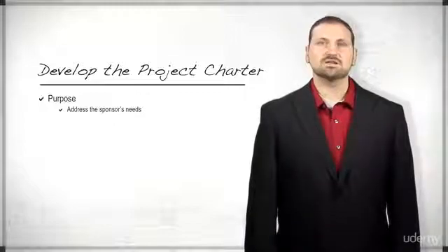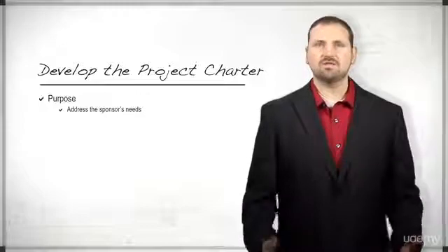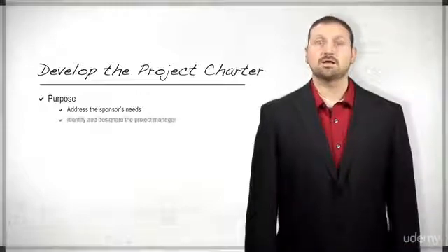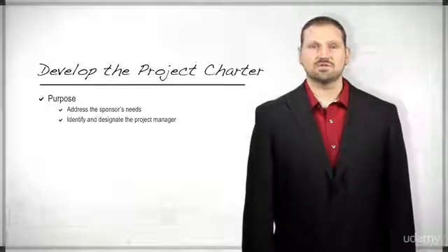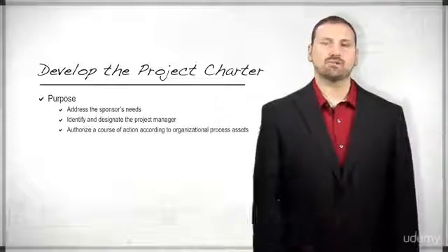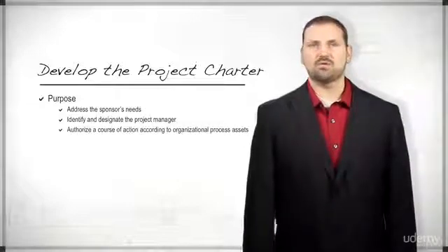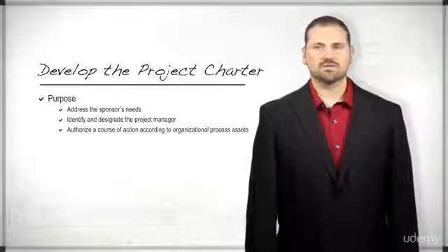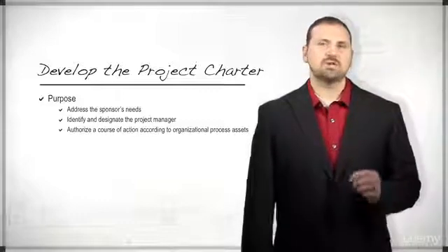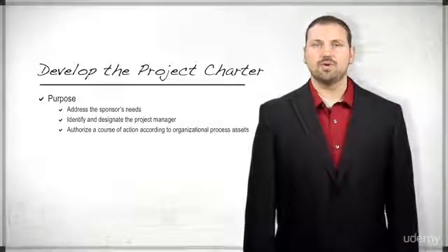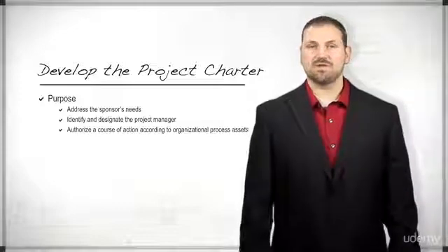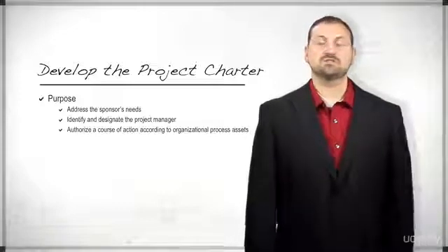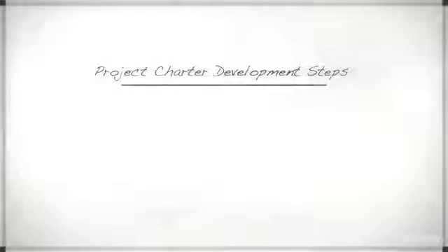So the charter is intentionally set up as a preliminary or high-level document that will provide the two crucial next steps. It will identify and designate the project manager and empower the project manager with the authority to drive the project according to organizational process assets. This document will be reviewed and approved by the project manager and the sponsor, at which time project activities may commence. So what does the project manager look for in development of the project charter?